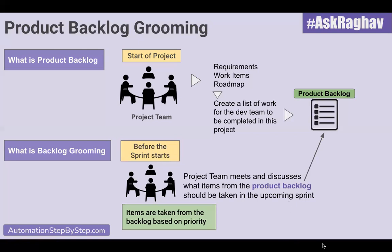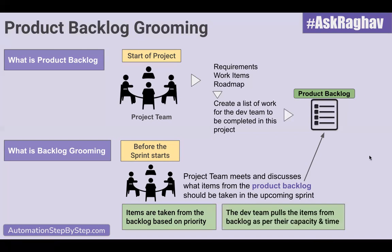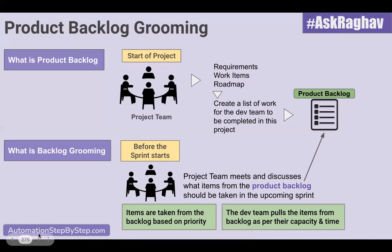Here, we take items from the product backlog and decide these are the items we will be completing in this particular sprint. The items are taken from the backlog based on priority — it can be based on project priority, requirements priority, client priority, user priority, and different factors. And the dev team pulls items from the backlog as per their capacity and time. So whatever items they can take based on priority and cover in this sprint, they take based on their time and capacity. This is what product backlog grooming is.